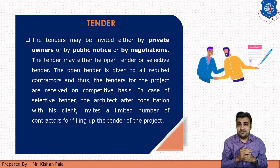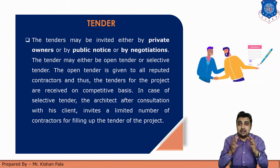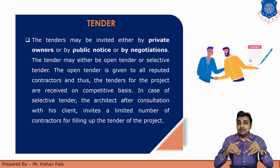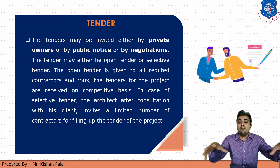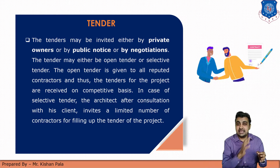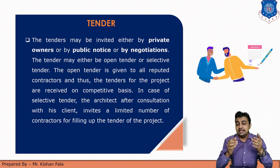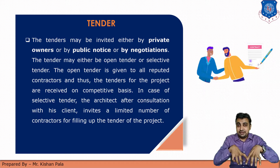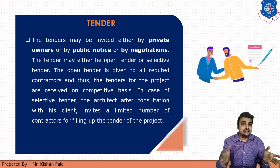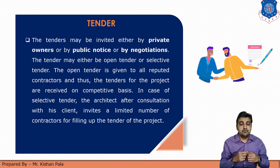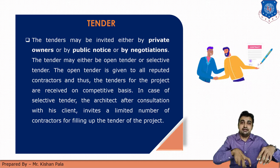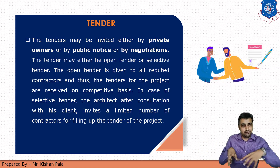If we talk about the types of tender, there may be three types. For example, a government body wants to construct a particular road construction work. In that case, the government body will offer that road construction work to the open market — this is the first type of tender. In the second case, for example, you are an owner working with a particular private consultancy and want to offer construction of a specific residential building involving specialized work — such as pre-tensioning of elements, grid slab, or tapered section of steel structure. You know that type of work will be done by only a few contractors — that is the limited work, and this is the second case.